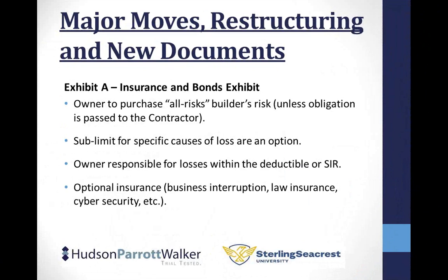Well, if you don't take anything else away, one of the things you take away from this program, not necessarily an AIA change, is that builder's risk is a very customizable coverage. And because you're giving mutual waivers to each side of the contract, the broadest coverage that you can get is in your best interest as the contractor. So just defaulting to letting the owner make that decision and buy that coverage, we would not advocate for that. At a minimum, you should insist, before you close a deal, that you have some input into that coverage.